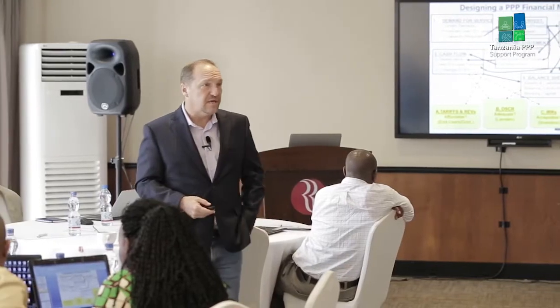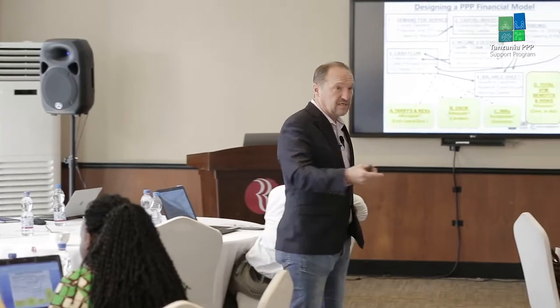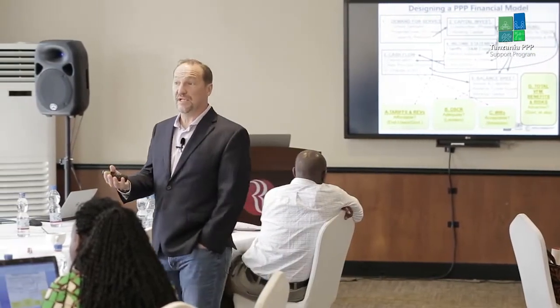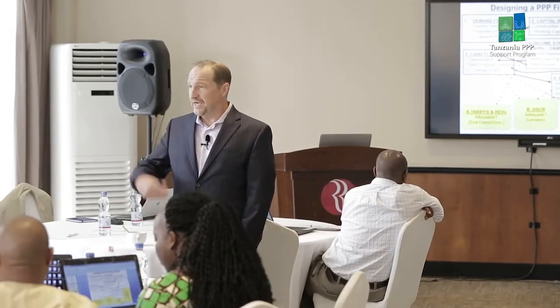And we've said it should usually consist of a demand worksheet, or some worksheet that shows us what is the capacity of the project and what is the level of demand. Different projects will face different demand risks. But we want to know, it'll also affect things as we saw in our vehicle inspection station, like when should phase 2 happen? When do we need to provide the additional capacity for phase 2?